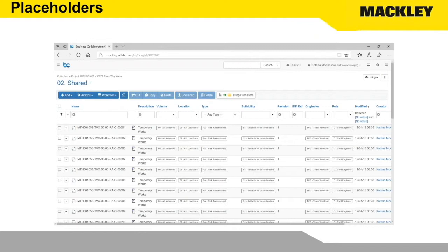It doesn't matter what he's called his document, the document name is changed, the metadata is added automatically, and we then know that his information will appear in those searches, and that the information he's uploaded is then BIM 1192 compliant, and we can pass it through to the client CDE at the end of the project, knowing that we're not relying on our supply chain being experts in BIM, which, to be fair, they're certainly not.